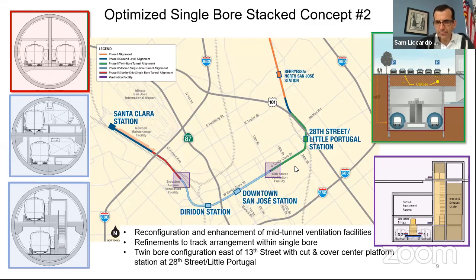Yes, and it's very interesting because the expedited project delivery pilot program does not follow the same schedule as a full funding grant agreement. We have the commitment from the federal government for $150 million. They gave us the $25 million earlier, and then the other $125 million at the event that you participated at. So we have $150 million committed.